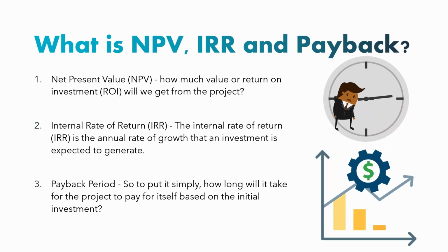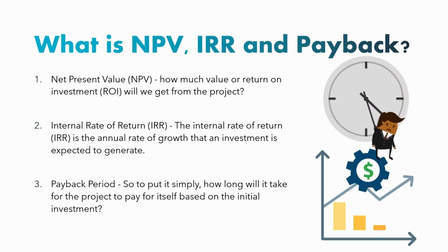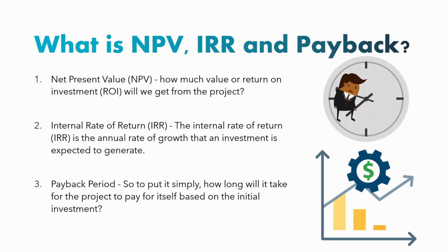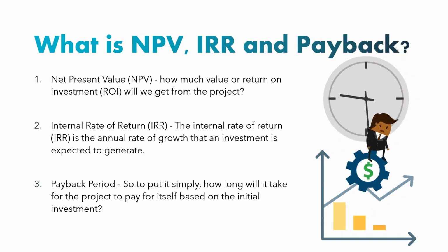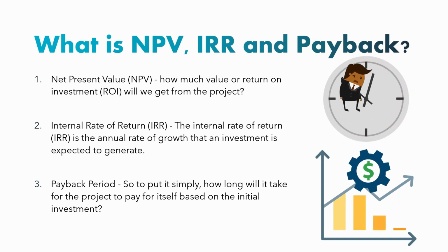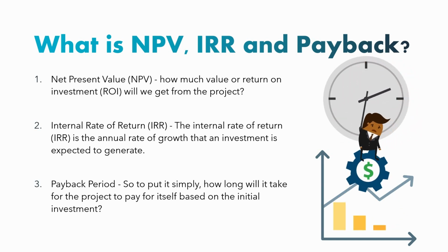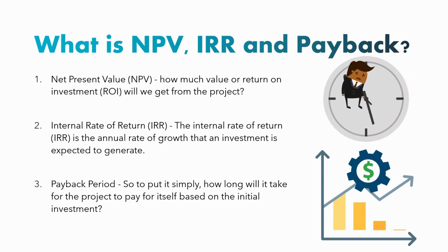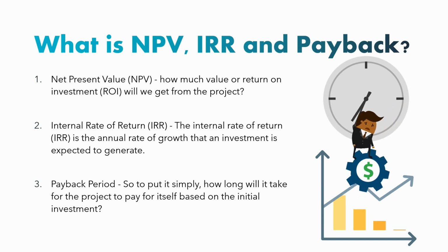The payback period is exactly as it sounds. How long will it take for the project to pay for itself based on the initial investment? The rules on this are set by the organisation. For example, the investment has to pay for itself within a 5-year period, or it will be rejected.